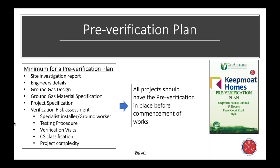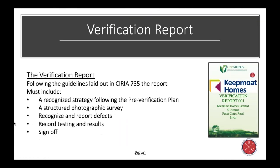You've formed your pre-verification plan and done a pre-verification meeting — everybody knows where they stand, so you're good to go. A verification report should follow the pre-verification plan. If the installer decides to switch from Visqueen to Duta, that is a design change — it has to be identified and go through the process, including redrawing all drawings. You wouldn't believe how many times that happens. A recognized strategy following the pre-verification plan includes a structured photographic survey, recognizing and reporting defects, recording testing results, and signing it off.